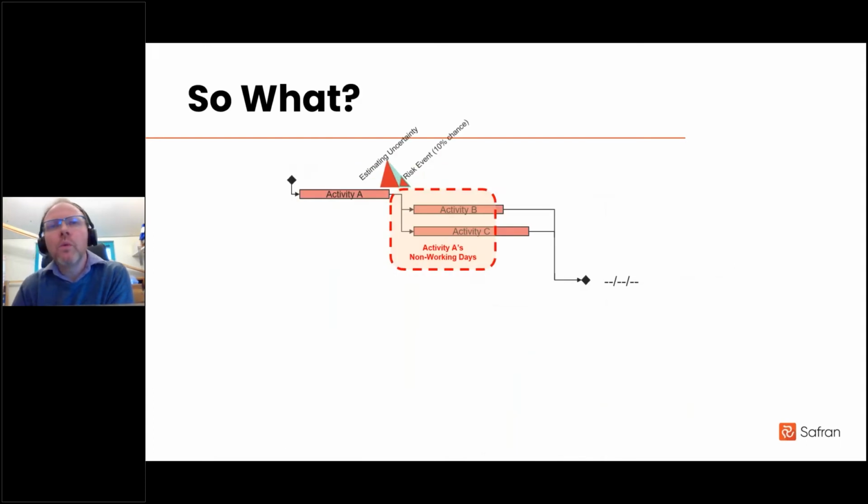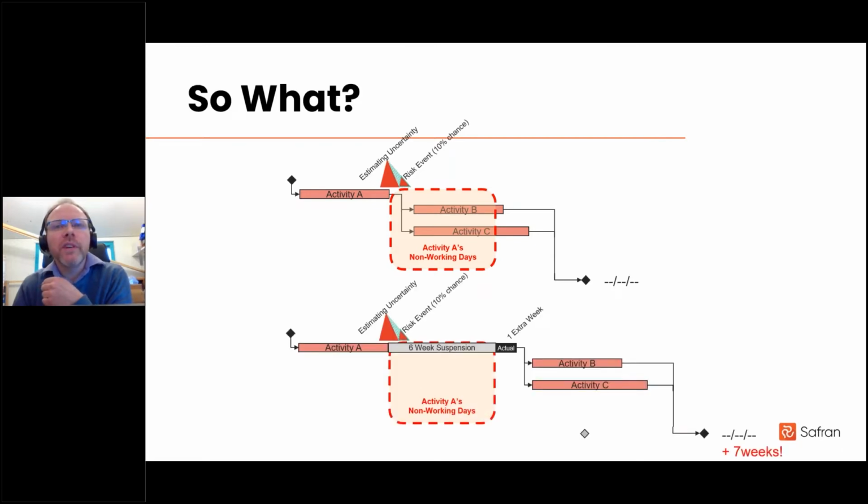So what if your schedule activity calendars have non-working periods inside them? So even slight delays may allow a critical activity to creep into one of these work embargo periods. And that could last for several days, weeks, or maybe months, depending on the nature of the work and the associated constraints. So every time you accidentally model risk events impacting in series, you might be slipping your simulated critical path unnecessarily into those significant delays. And again, this could make for quite alarmist reporting.